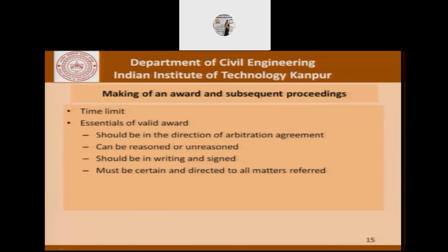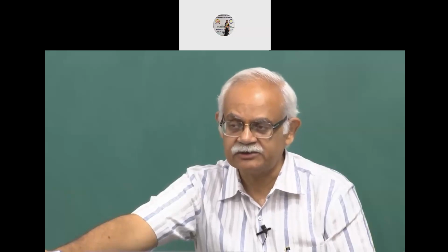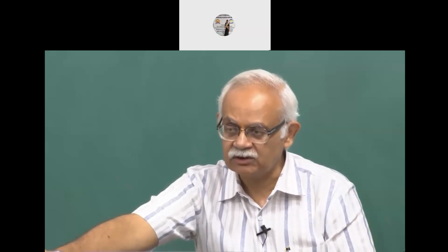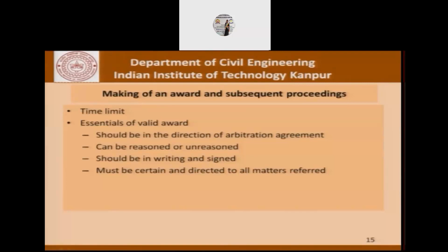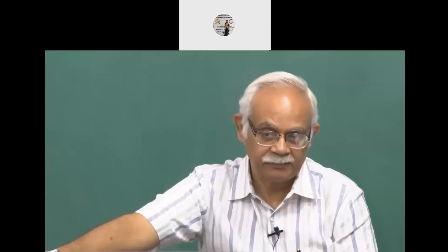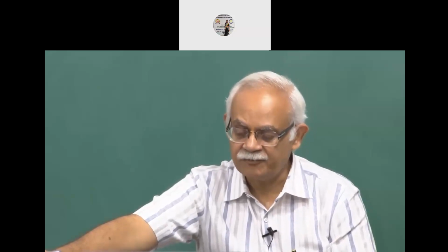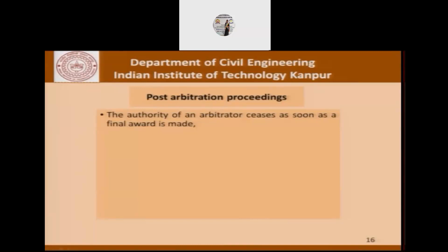We are referring to the terms of reference. All the terms have to be unambiguous, addressed, and without exceeding, must be consistent, and should contain all directions for its performance. The arbitrator's award also has to have directions as far as the arbitration proceedings are concerned.